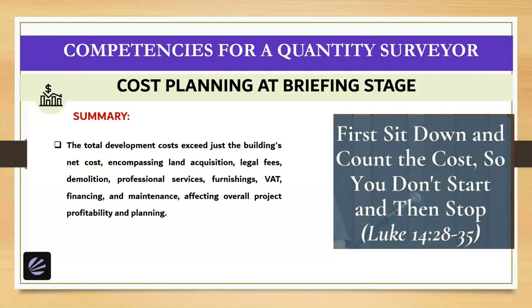So in conclusion, remember that the total development costs exceed just the building net cost, encompassing land acquisition, legal fees, demolition, professional services, furnishings, VAT, financing and maintenance, affecting the overall project profitability and planning. So in conclusion, first sit down and count the cost so you don't start and then stop.